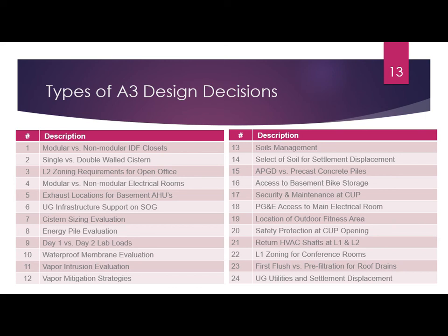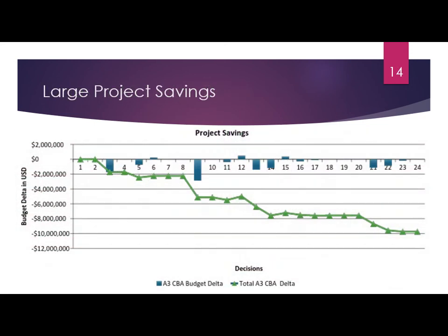What do we want to get? The criteria, factors? What are the attributes? So in CVA, one of the key points of the discussion is that you want people to separate, to show what are the facts, what are the attributes of the alternatives that help you differentiate the alternatives, and then you make assessments over how important those differences are. So there's a lot of information that needs to be done.